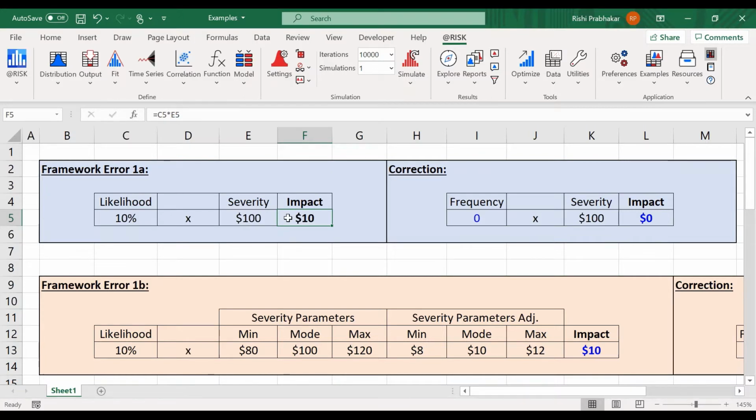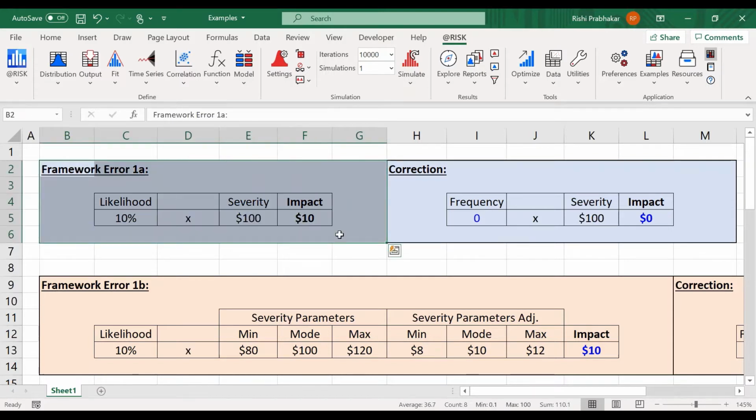You're not. Now, some people will try to argue that, but this is the expected value, and so it evens out and the highs and lows cancel, and all these sorts of things that sound okay, but simply aren't true, for the simple fact that you are never exposed to $10, and this particular event either happens once or it doesn't. You don't get to ride the highs and lows of this event. You will do your project or whatever this risk register is valid for once, because it's there once, and you will either pay $0 or $100.